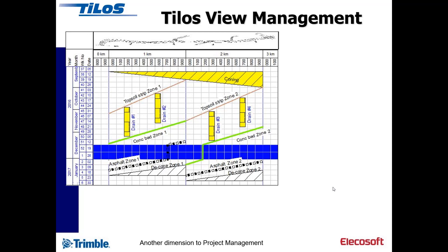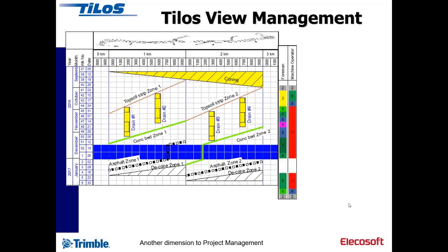We've got a time cell on the left hand side, and in there we can create our own time ruler with as many columns as we want. We can have week numbers, including strange numbers that aren't annual, like Network Rail week numbers, not restricted to 3. And if the activities have got resources on them, then you can have a histogram with an individual resource picked out, and you can see how many are going to be used over time and color code those.